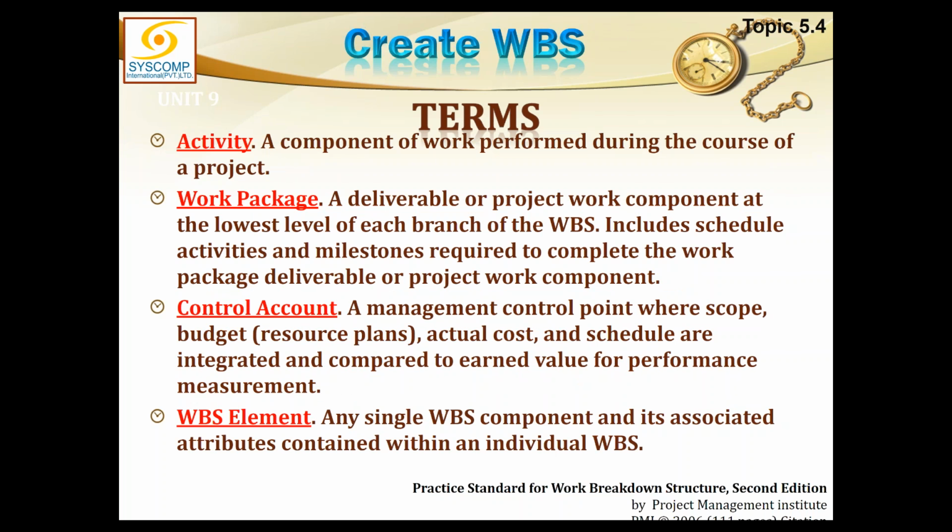We have got a 5-tier level WBS, and the lowest level is work packages. But the control account people may not be interested in monitoring each and every work package, although the project manager was interested in each and every work package. But the accounts people are interested maybe a level above the work package. Like you see, construction of a wall was a work package and the project manager was interested in noting the progress of that. He wants to have a progress on that. But the control people cannot go for every work package.